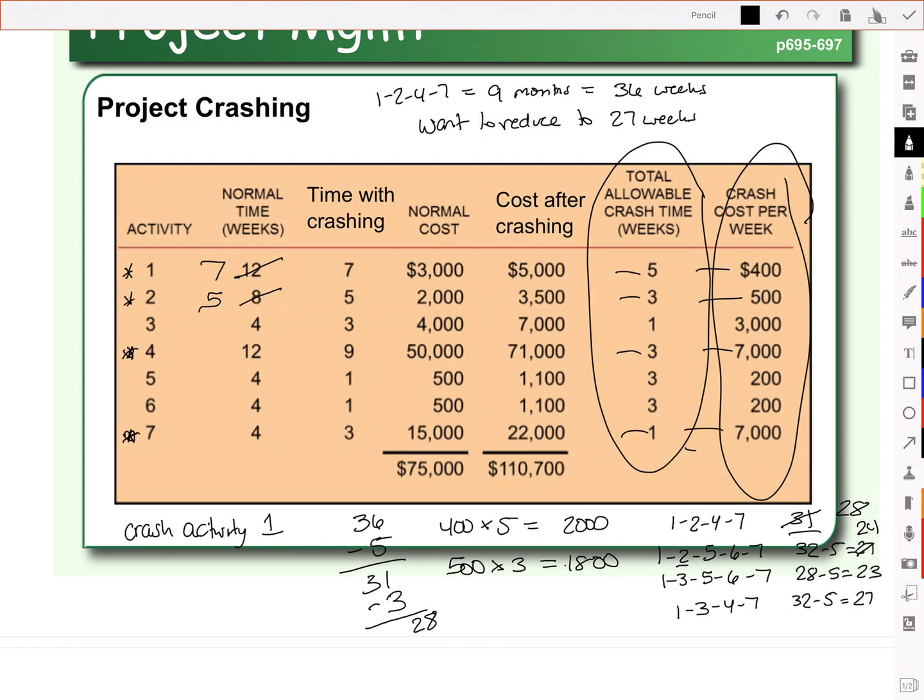Which means that as we choose to crash this project further, we need to pick from activities 4 or 7. Now activities 4 and 7 cost us the same, so it doesn't really matter which one you pick. You can pick either one. Let's pick activity 4. So we crashed 1 and 2, and now we're going to crash 4. And we'll crash activity 4 by 1 week.